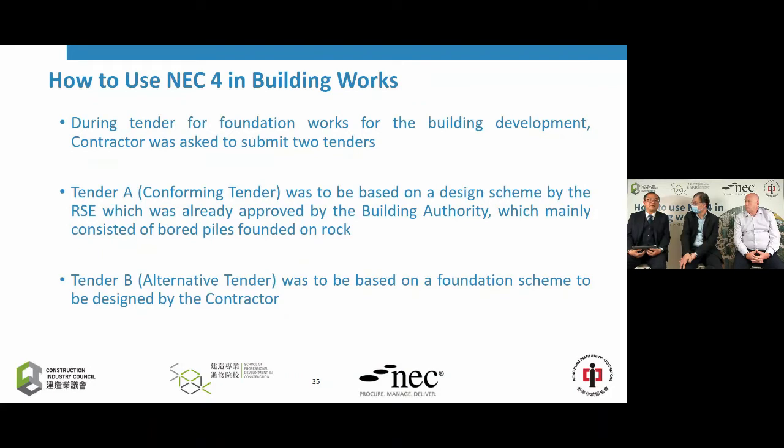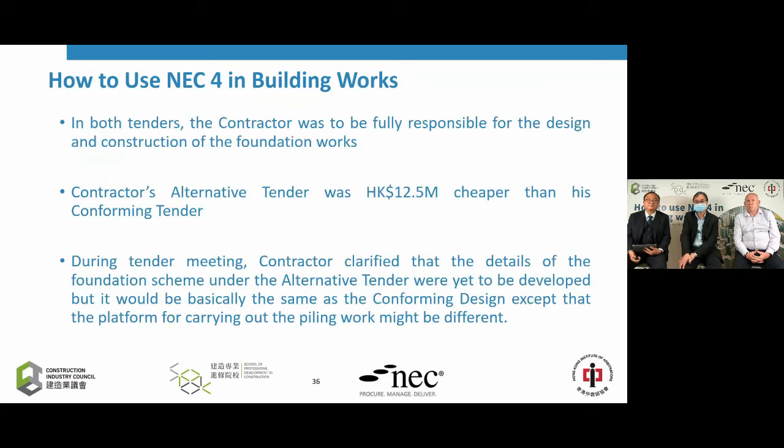They may come up with a design different from the conforming design, but which is still technically feasible and which may be cheaper than the conforming design. Faster, yes. In this project, it is actually the tender requirement that in both tenders, whether the contractor adopts the conforming design or develops their own design, it will be the total responsibility of the contractor for the design and construction of the foundation works.